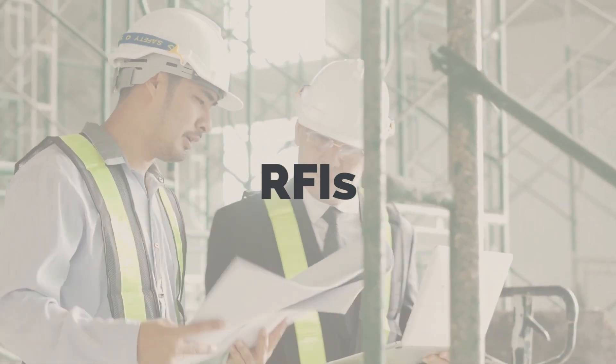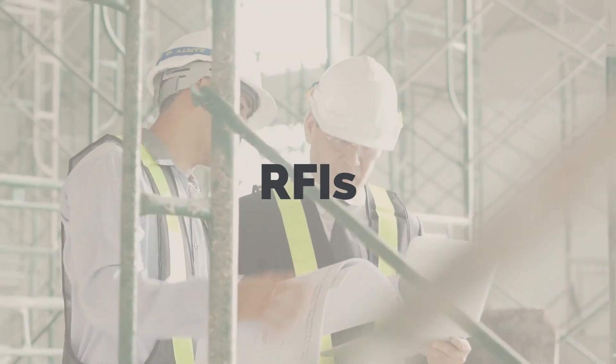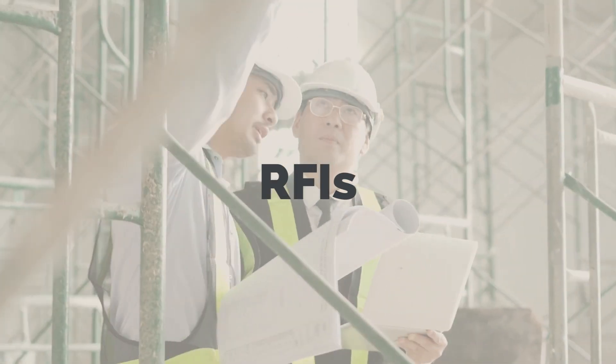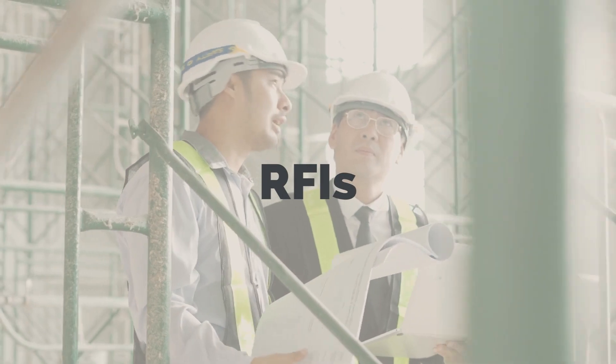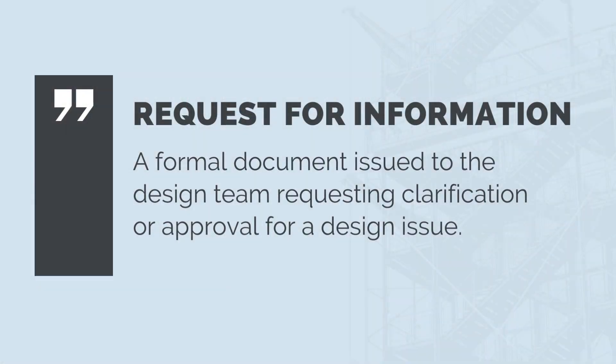What do we do if we find the design is missing information or we can't make sense of it? What about if we want to change something? A request for information, or RFI for short, is a formal document prepared by the construction team and issued to the design team requesting clarification or approval for a design issue.